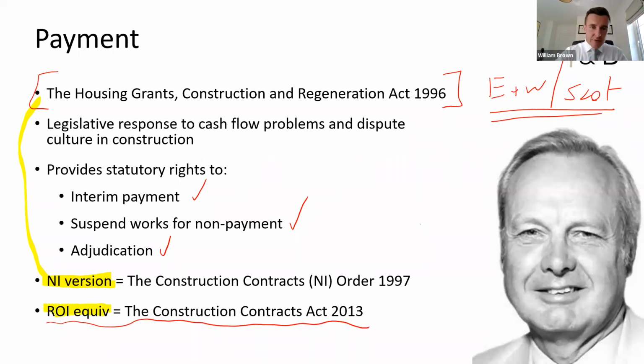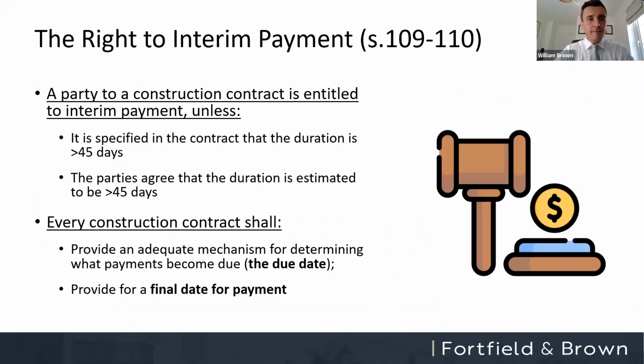It's subtly different. You do need to treat it as its own separate beast, but that is the Construction Contracts Act of 2013, which applies to all contracts entered into after July 2016. So all contracts that you're probably dealing with at the moment are subject to that act. And it does something very similar. It gives the parties the right to be paid, the right to suspend, and the right to adjudicate them.